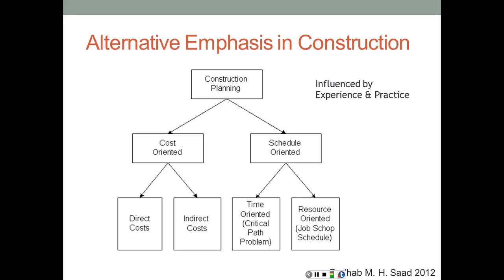For example, if you have a central purchasing department at the headquarters of the company, this purchasing department is working on all projects. The same goes for any scheduling department, or any central department, the legal department, for example. You cannot pinpoint and say they worked that long on this particular project or that project, so it's going to be a general overhead for the head office, whereas direct costs are going to be the cost of the people assigned to the construction site: field engineers, superintendent, project manager, etc.